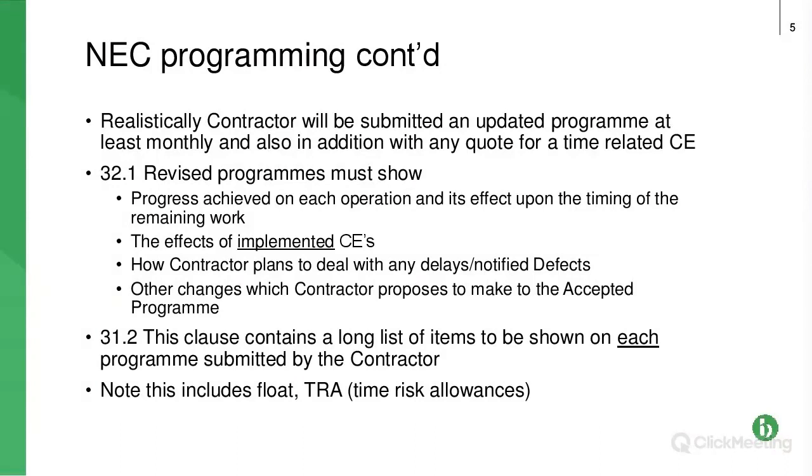And also, please note that a revised programme has to be submitted with any quote for a compensation event where you are saying that an extension of time, that additional time, is required because of that compensation event. So please don't forget about that. That's a key area where a revised programme is required to show the additional time required. And of course, hopefully, again, you can see why it's critical that you have a base accepted programme at the start of the project, so that if you have any compensation events, you can incorporate them into that programme.